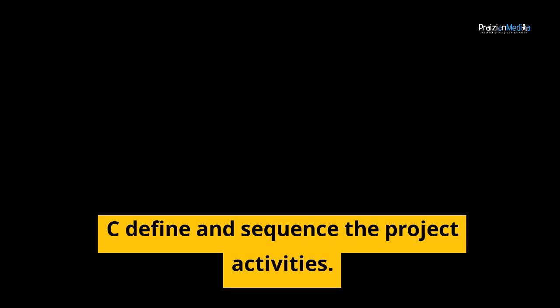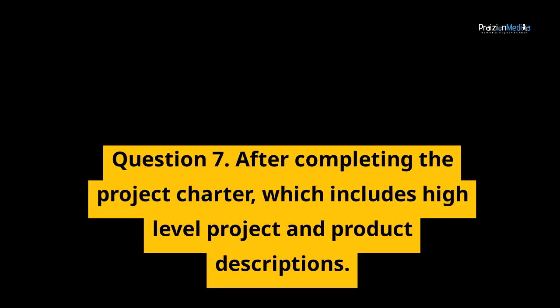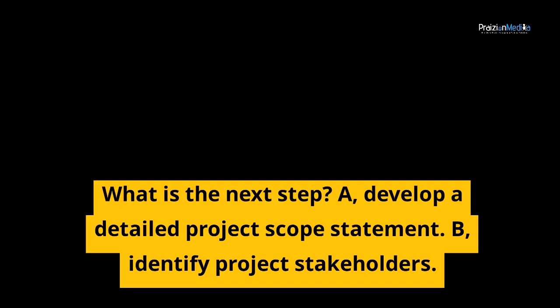Correct answer, C. Define and sequence the project activities. Rationale: after creating a work breakdown structure, WBS, the next step is to define and sequence activities. Question 7. After completing the project charter, which includes high-level project and product descriptions, what is the next step?